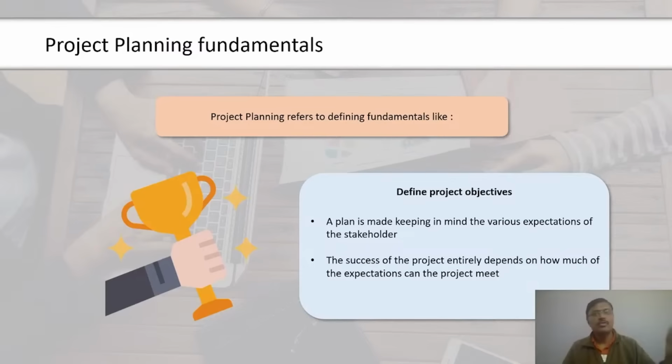The key tools and techniques of this process are the performance reviews. Performance review is measuring, comparing, and analyzing schedule performance, such as actual start and finish dates, percent complete, and remaining duration for work in progress. The other tools and techniques include resource optimization techniques, modeling techniques, schedule compression, leads and lags, scheduling tool, and project management software. In develop schedule process, these techniques are used for the first time to develop the project schedule, whereas in control schedule process, these techniques are used to update the project schedule.